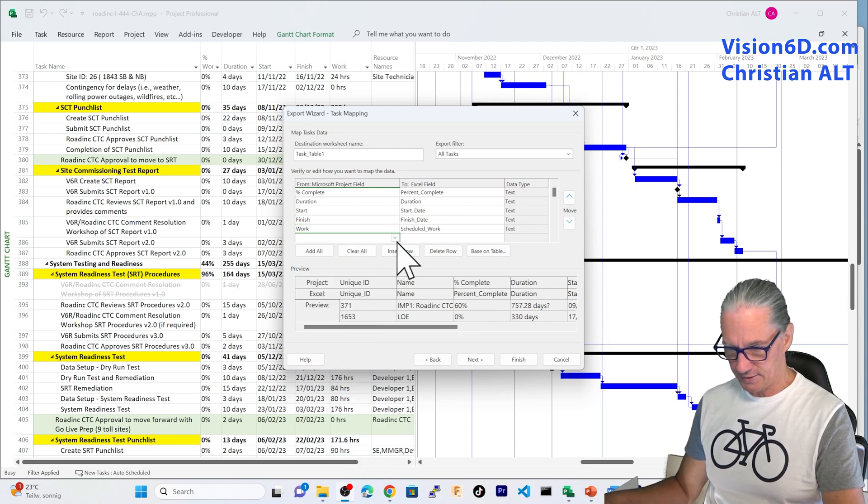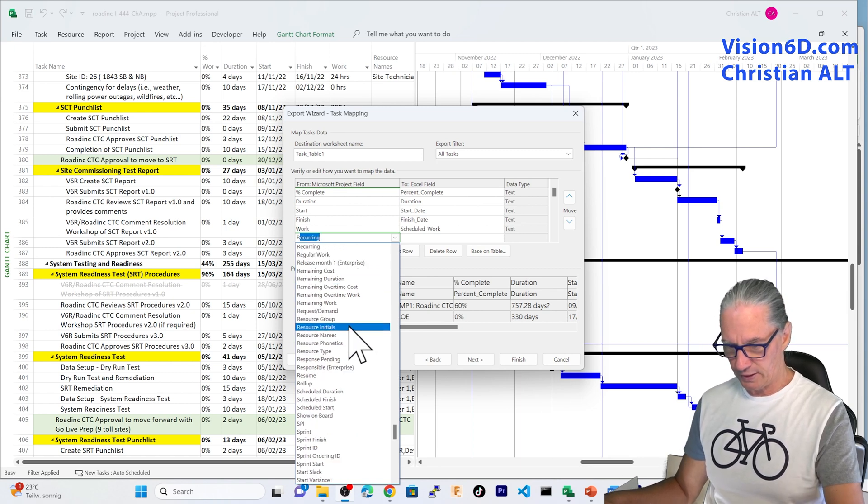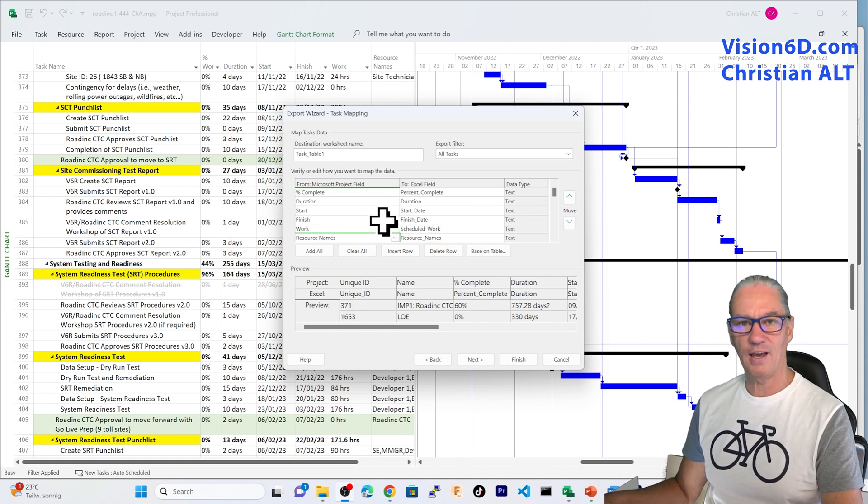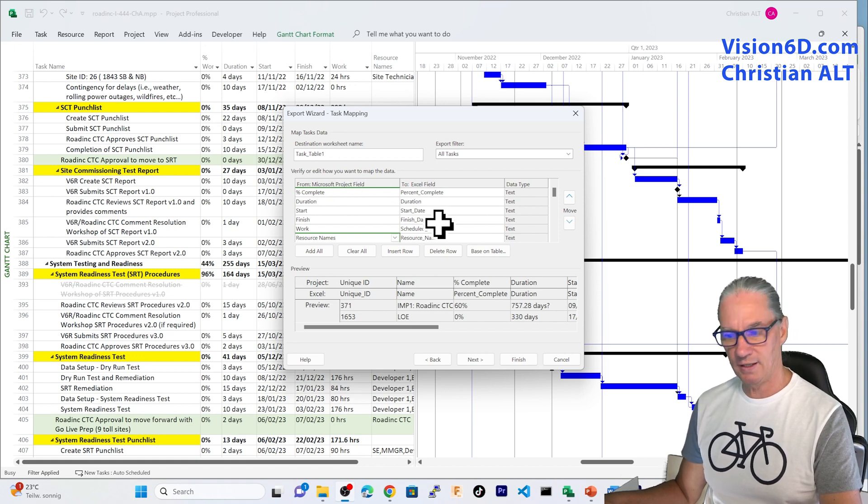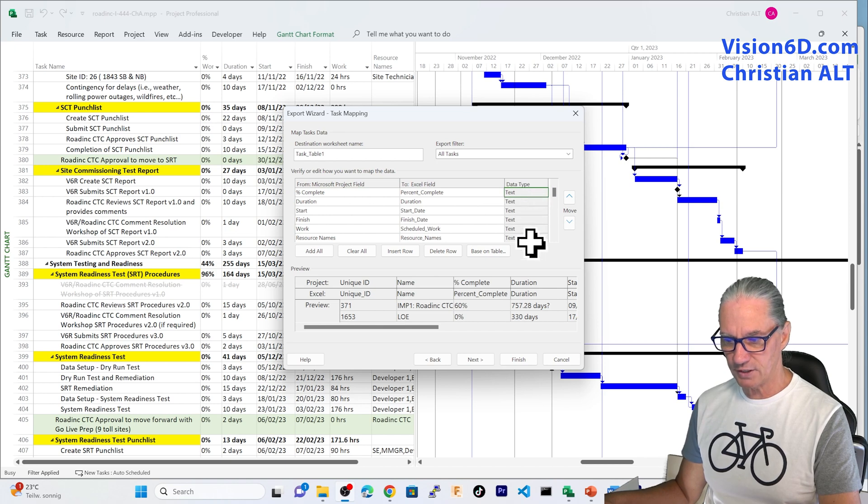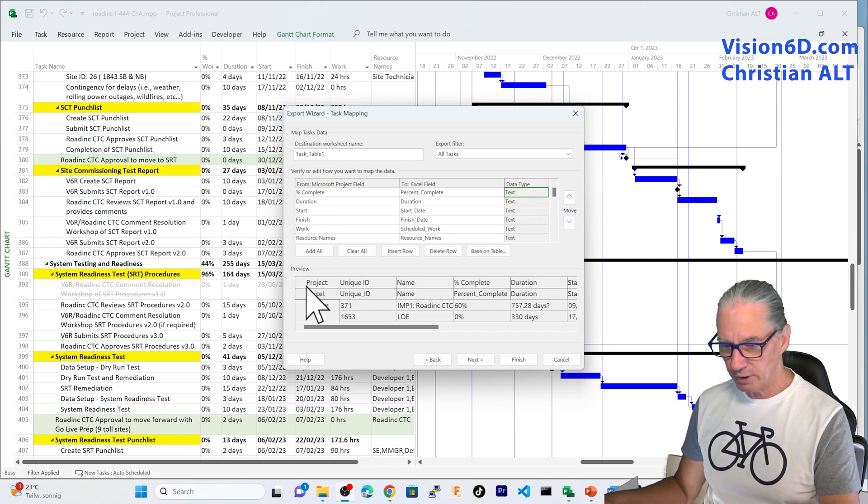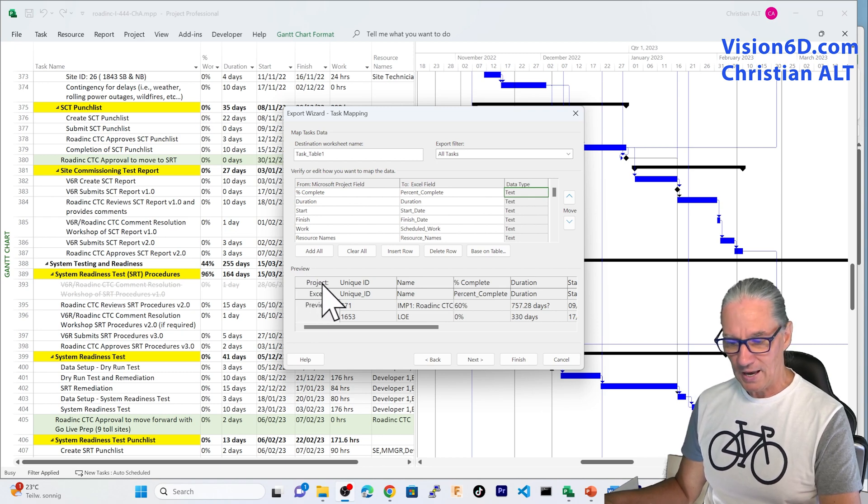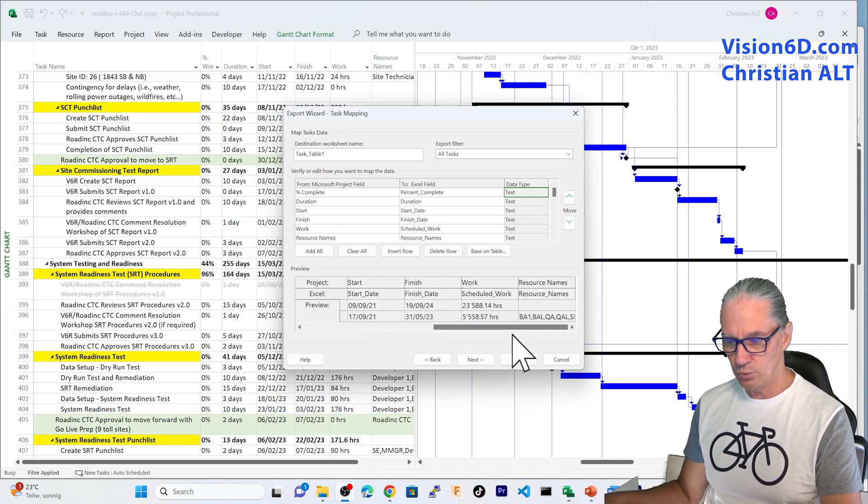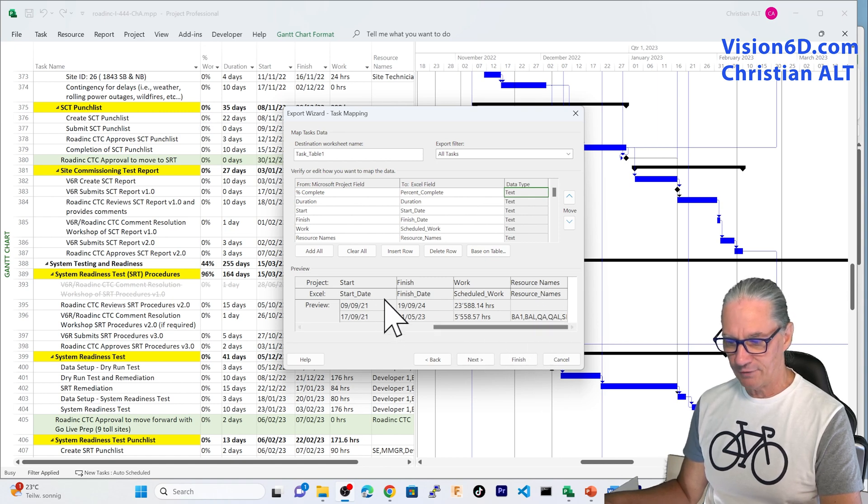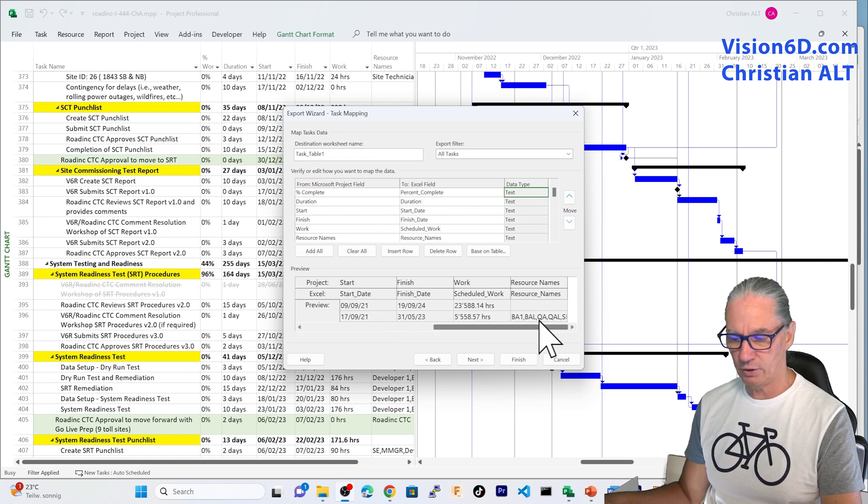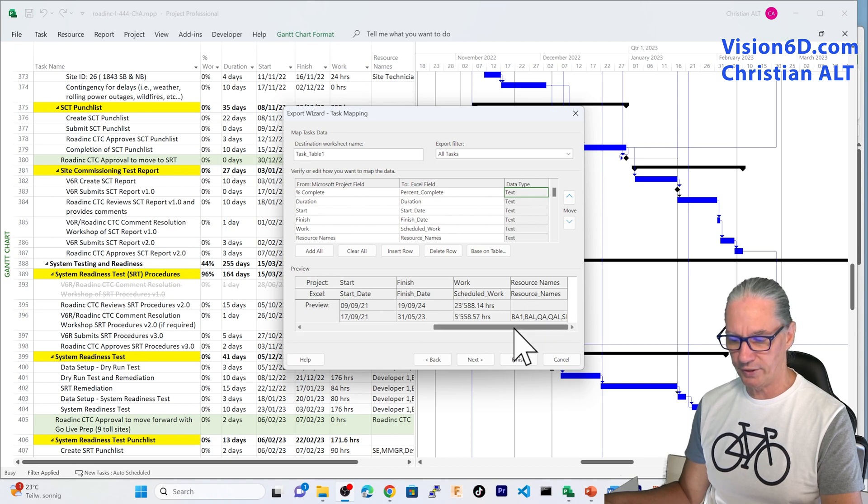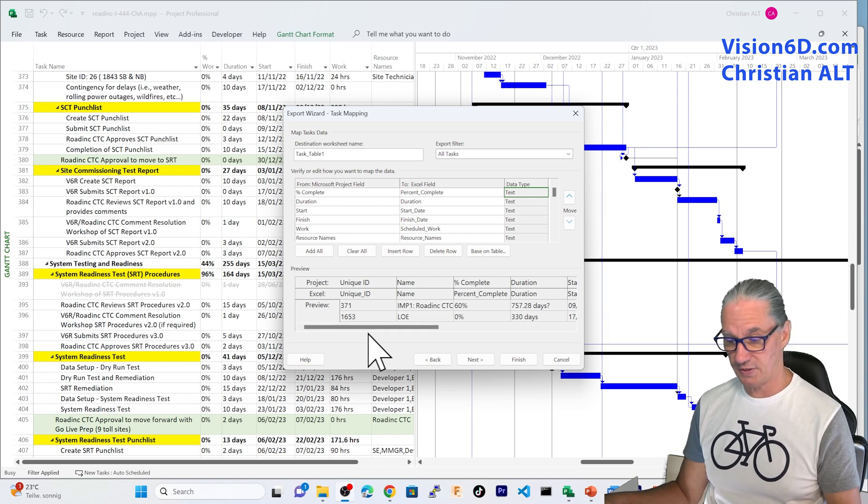And here, last, I want to know which are the resources that will work on this project. So, with that, I have here the mapping from the fields in project to the fields in Excel. You see here that you have data types that are defined. Here below, we will see the first preview. And with this, we have on the first line what project is doing. You see, I can move and we can go till the end of the resource names. After that, we see the second line is what the column is named into Excel. And below, we have two examples. I have here an example where we have resources and another line where there aren't any resources assigned to this task.